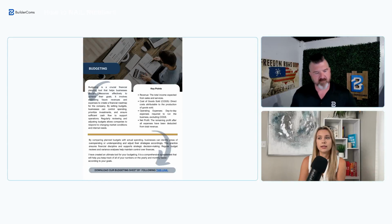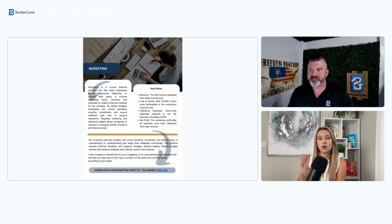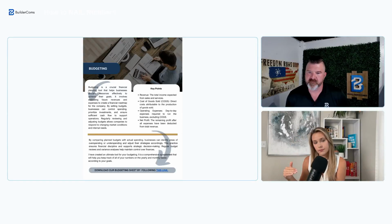We think that when we create an estimate, it's perfect, that's what it should be, but things never go like that. There's always things that pop up, materials change in price, your labor takes longer than you expected. I mean, you name it. You have to track what you're actually spending, plus what you actually have outstanding versus what you estimated. Because if you underestimate it, the next time you're building an estimate, it is going to be the same problem. And if you don't catch it on time, at the end of the year, it's going to be too late to fix anything when you're doing your taxes.